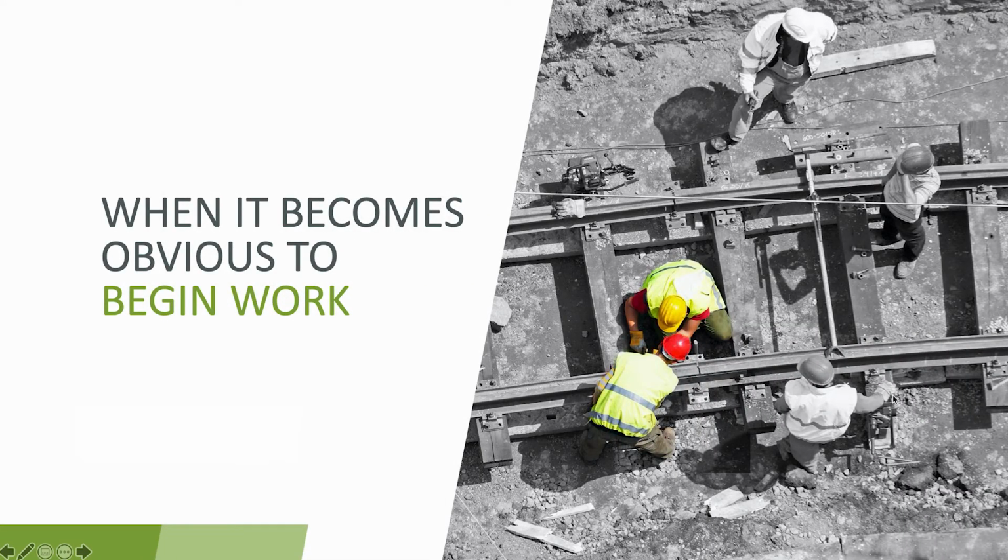First and foremost, the number one thing that you want to do when it comes to advanced work packaging is you don't want to start work that you're not ready to begin, work that you can't finish. Because the number one killer of efficiency is stopping the operation and having to start it again. And so taking a break in the operation.